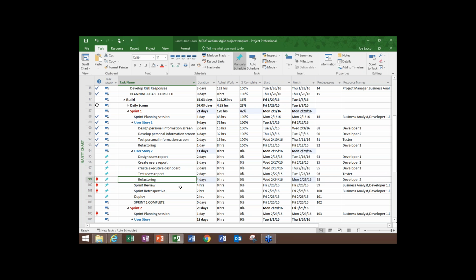What has also happened here that's interesting, we've got some over allocations occurring. That's simply because we've got the work set that way, and we're actually overlapping into some areas. And because they're manually scheduled, here's the other thing to remember: because they're manually scheduled, they didn't automatically move.